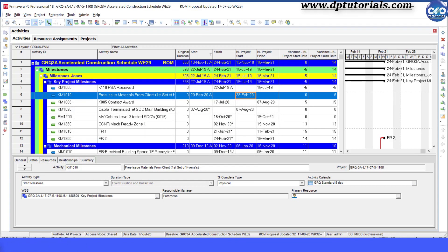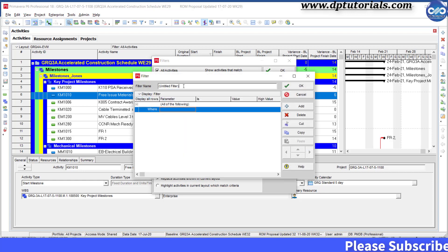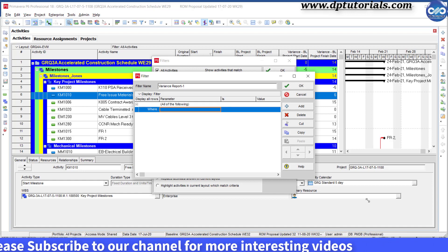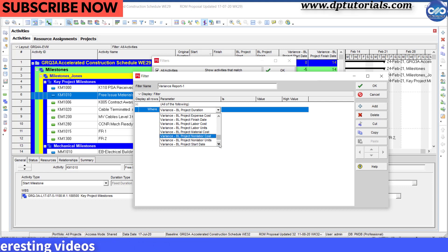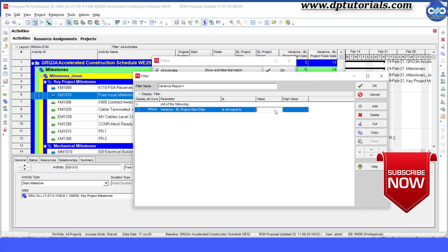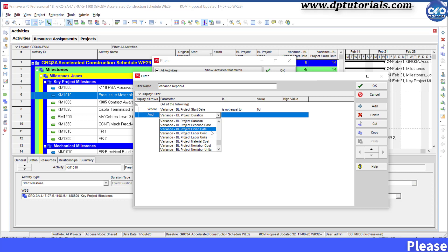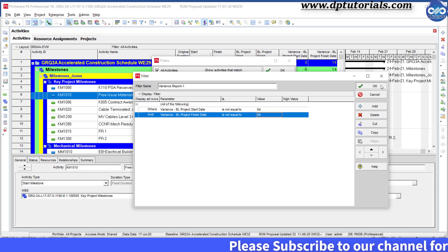Now let us create a Variance Report 1 by clicking on this filter icon. Click New to add a filter and give a name saying Variance Report 1. Give the condition as: Variance Baseline Project Start Date is not equal to 0, add OR Variance Baseline Project Finish Date is not equal to 0, then click OK.